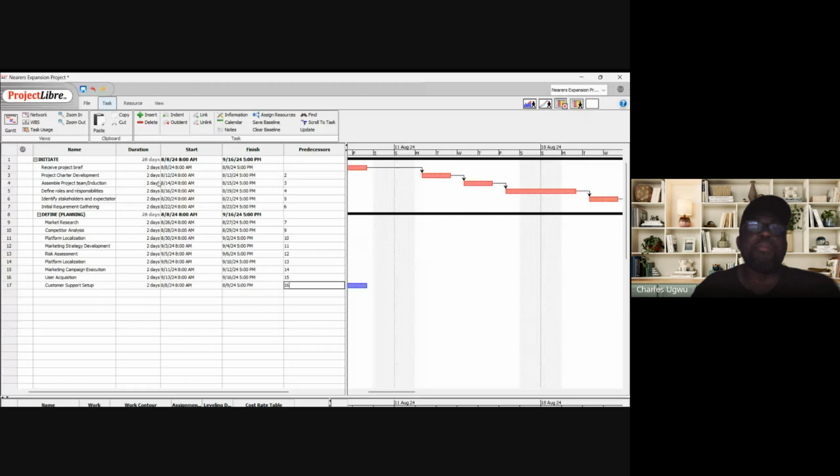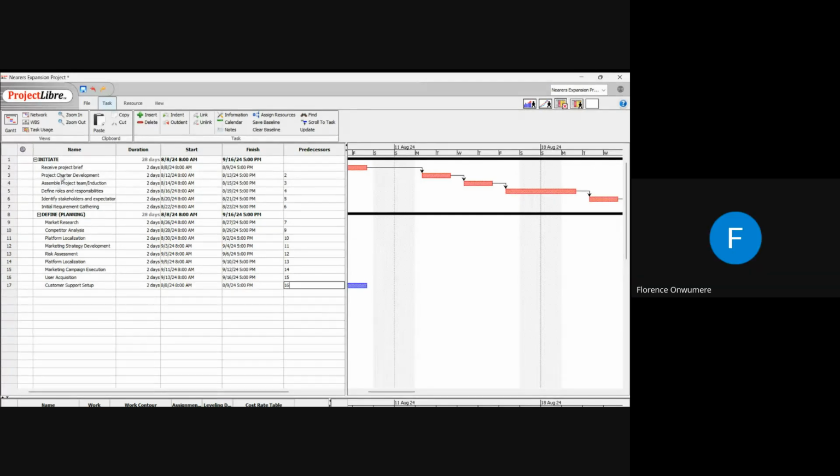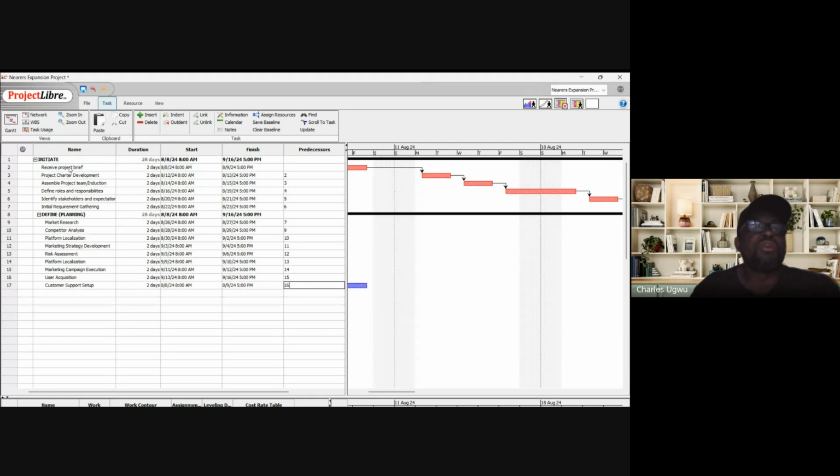I can come here and put project brief. So this is project brief, means that project brief needs to finish before we start project charter. And this is, we look at here, the column says predecessors. So what you'll be adding on is every task, you add predecessor to that task. Are you getting it? Yes, sir.